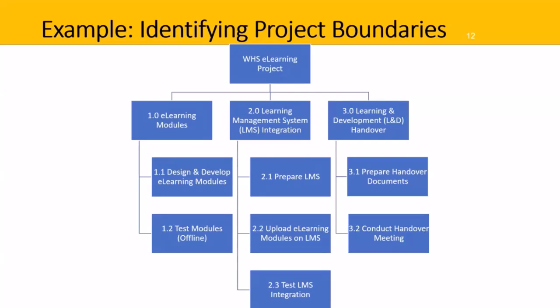Now, some people will use project management deliverables across the top. So that first line where we've got 1, 2, and 3 might be initiate, plan, execute, and close. My preference is just to use the product kind of deliverables that I'll be handing over. Some people will be using phased deliverables. Mine are more product orientated here.